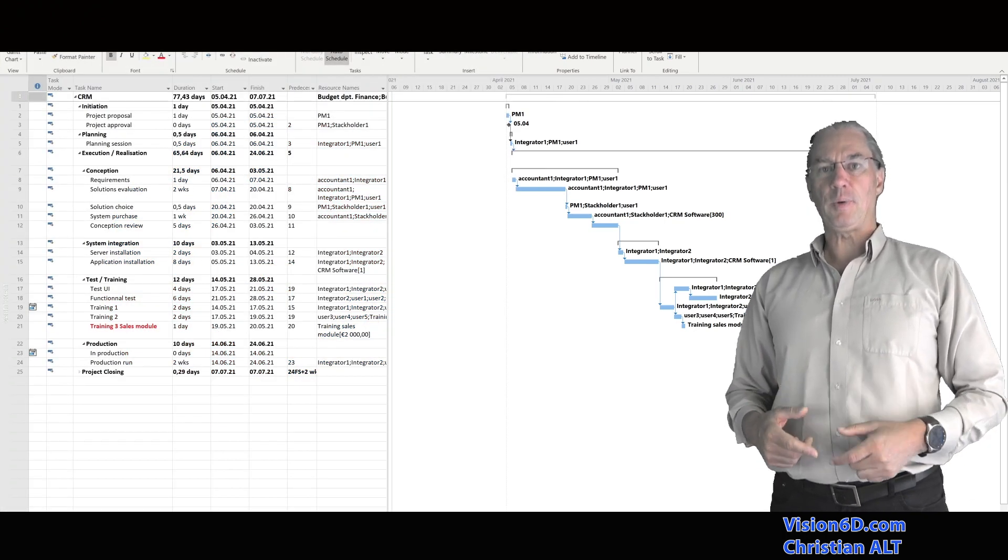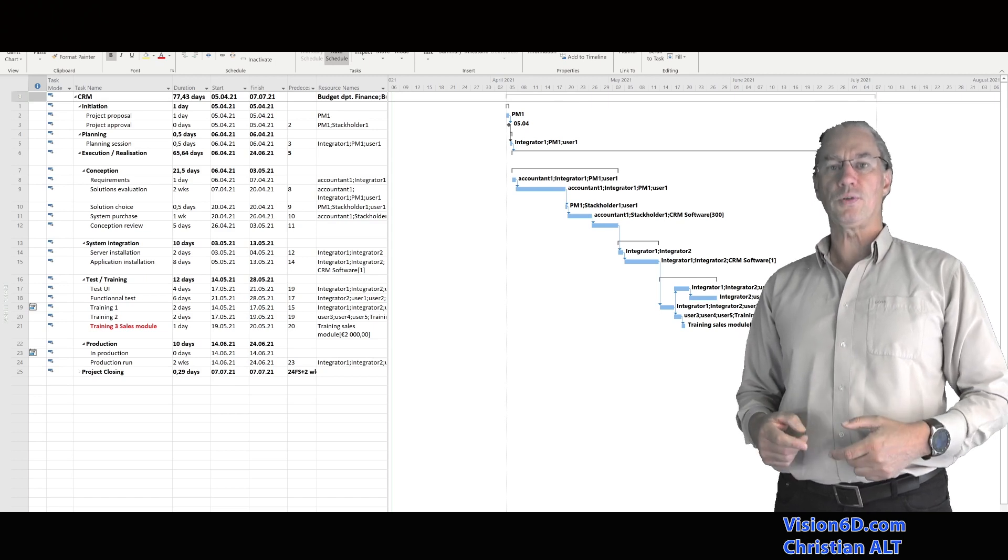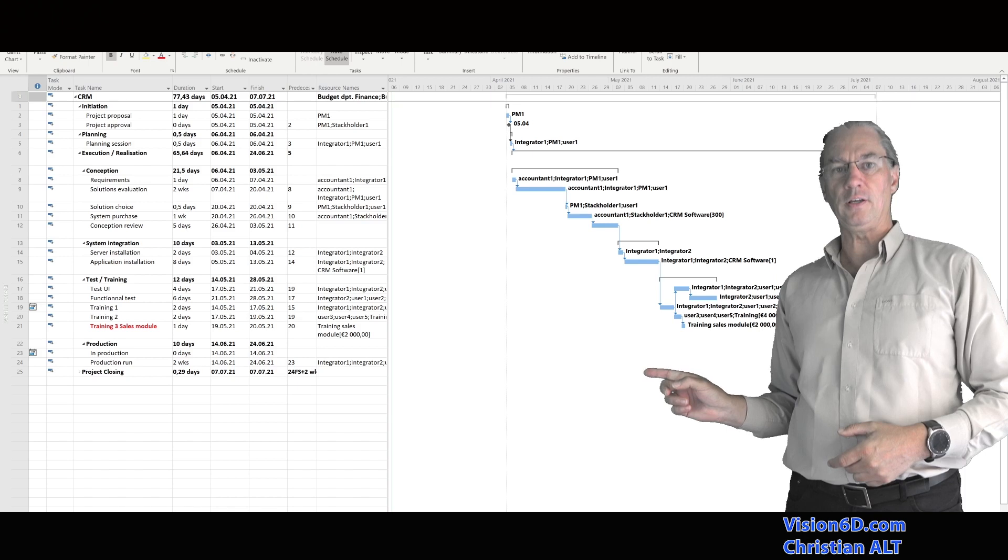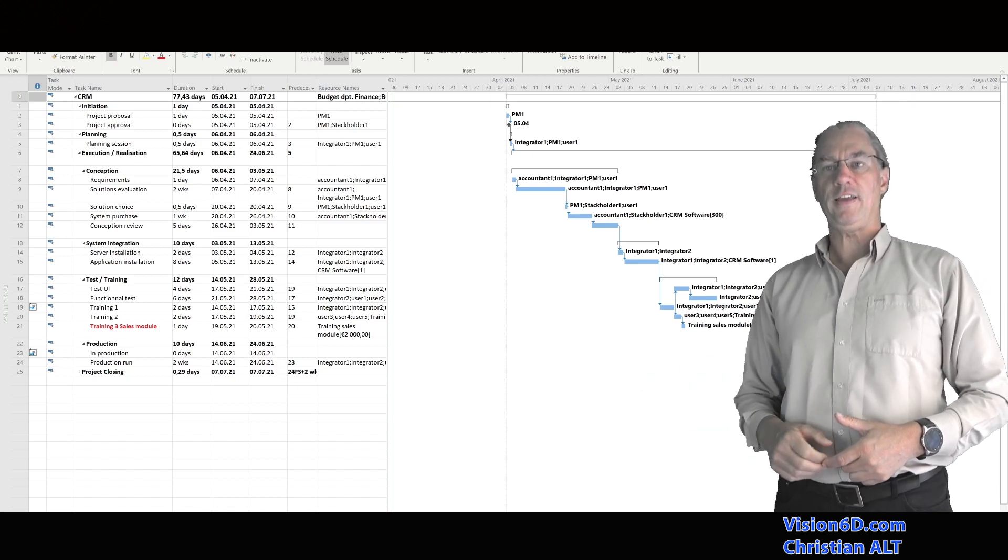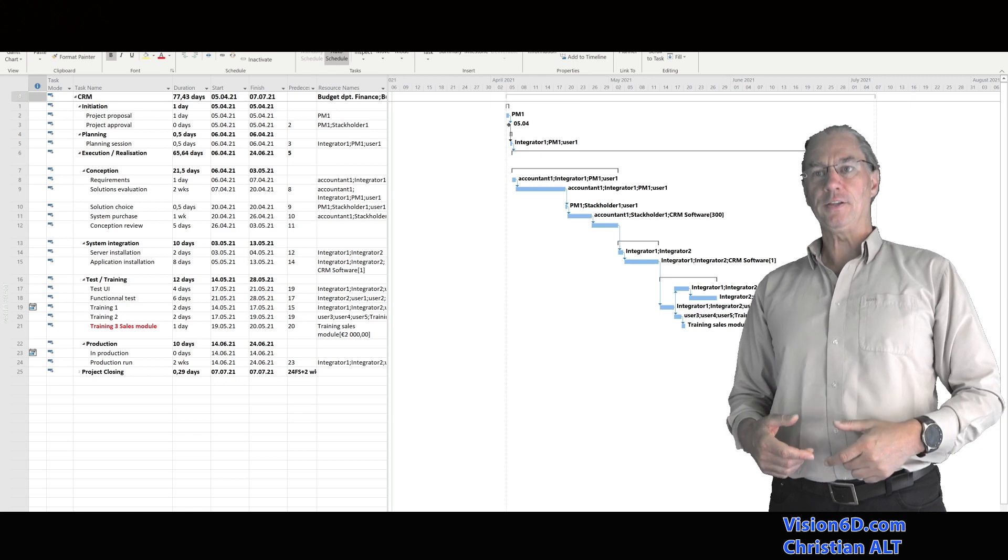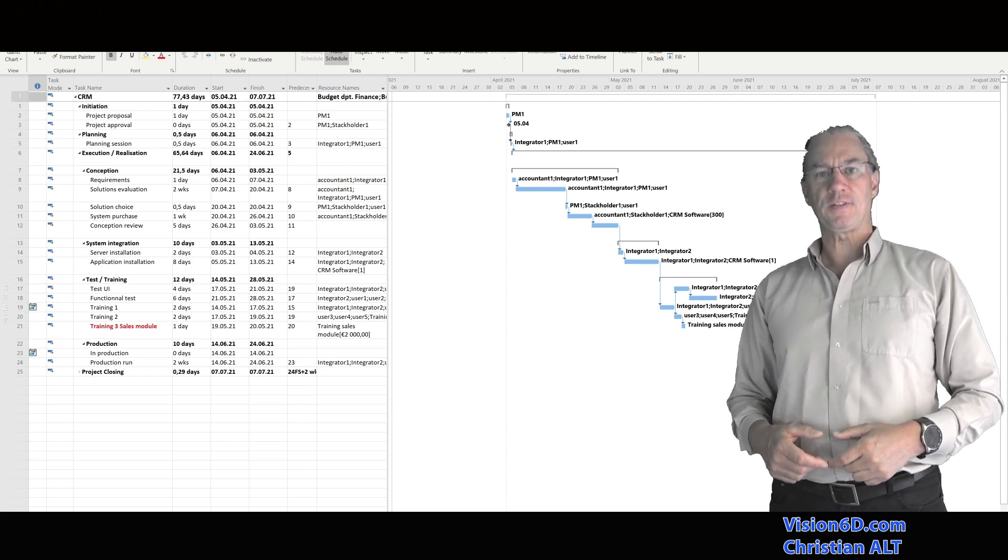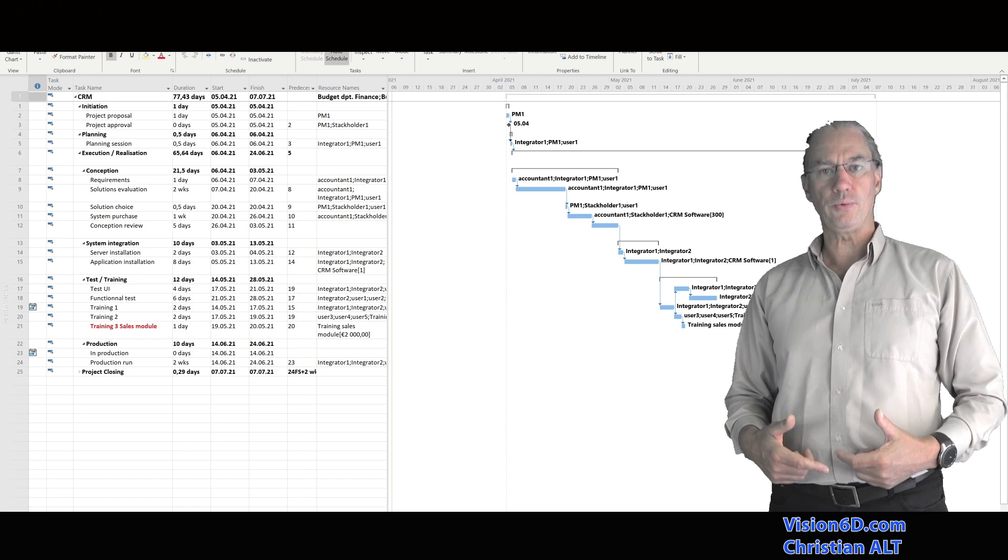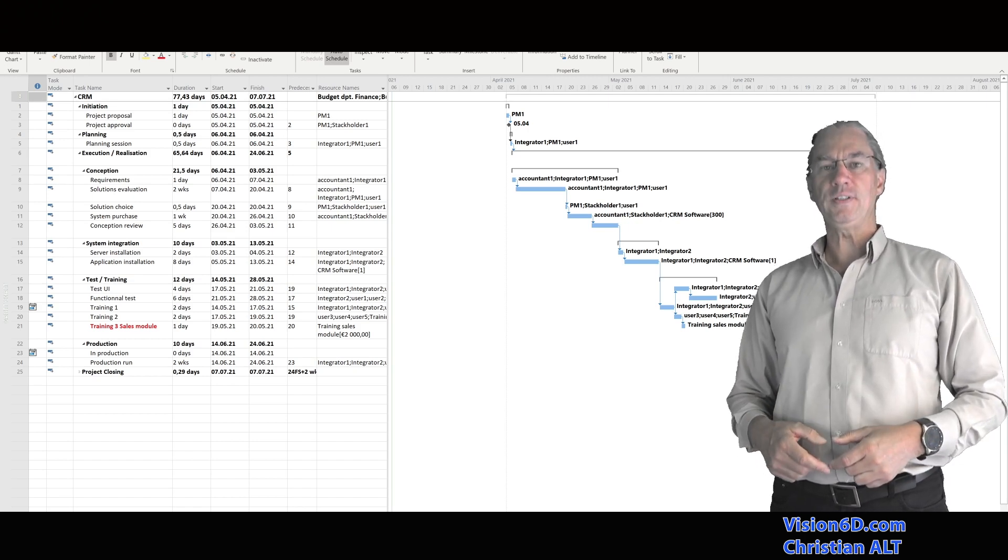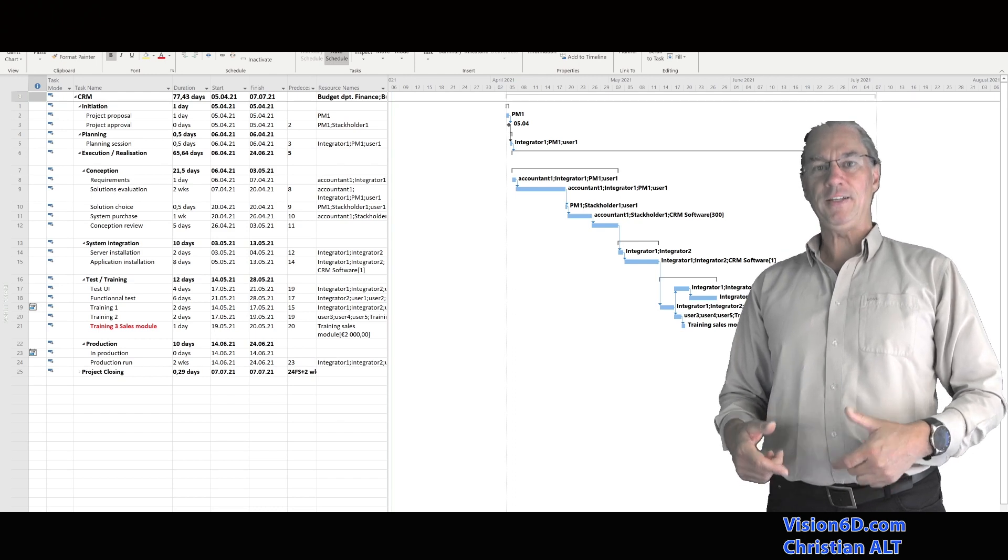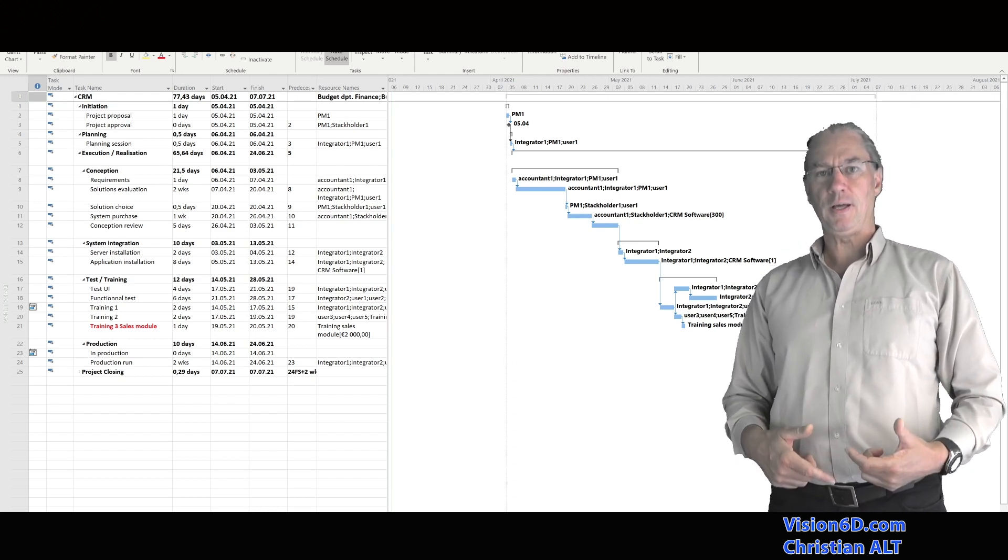As I explained, the sales manager wanted that there is a specific training for the sales people. It's what I've added there in red, and the cost of this task is 2000 euros. And I had already my baseline set up. So I need now to change my baseline.